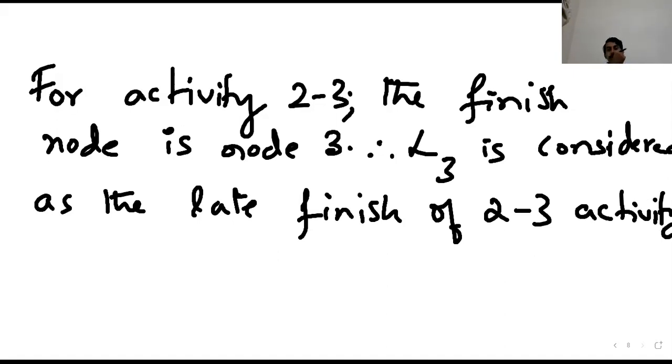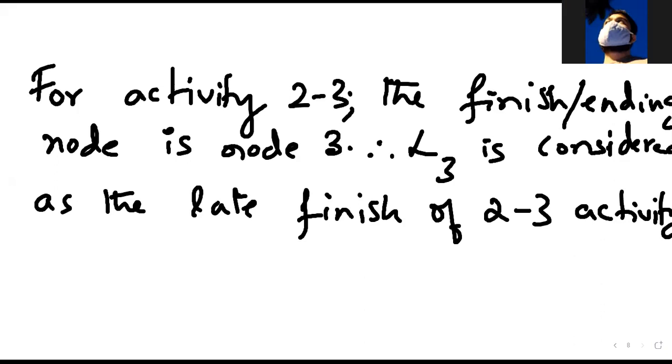Is this node sufficient for activity 2-3? The finishing node is node 3. Therefore, L3 is considered as the late finish of the 2-3 activity. Correct? Is this sufficient? Thank you. Okay. So just make note of this.